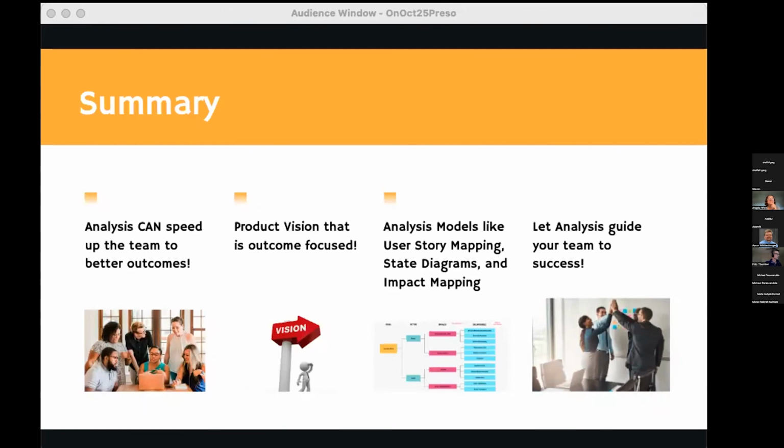How to better prioritize defect stories and technical stories. So Imain or Amani, I'm not sure how to pronounce that. I'm going to throw something out there. It might be a little up for debate, but I'm going to say most of the time your defect stories and technical stories are just poorly written user stories. So try to rewrite those from a user value perspective. I actually find there's very few teams that are very successful with defect and technical stories. You've got to be able to analyze the defects. So if you've got 100 defects reported, you probably have 10 user stories.